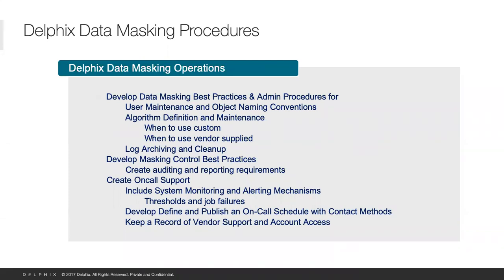Masking is very similar. Best practices, admin procedures for user maintenance and object naming conventions. Algorithm definition maintenance: when to use custom, when to use vendor-supplied algorithms. Get operational policies and procedures built out. Log archiving and cleanup is very important — even within Delphix. I've been in operations and gotten system halts because archive logs and file systems filled up with log files; figure out how to get those cleaned up. Develop masking control best practices, auditing and reporting requirements. On-call support for masking: threshold for job failures, if jobs are running too long, get communication out on who to call. And again, Delphix support should be available.